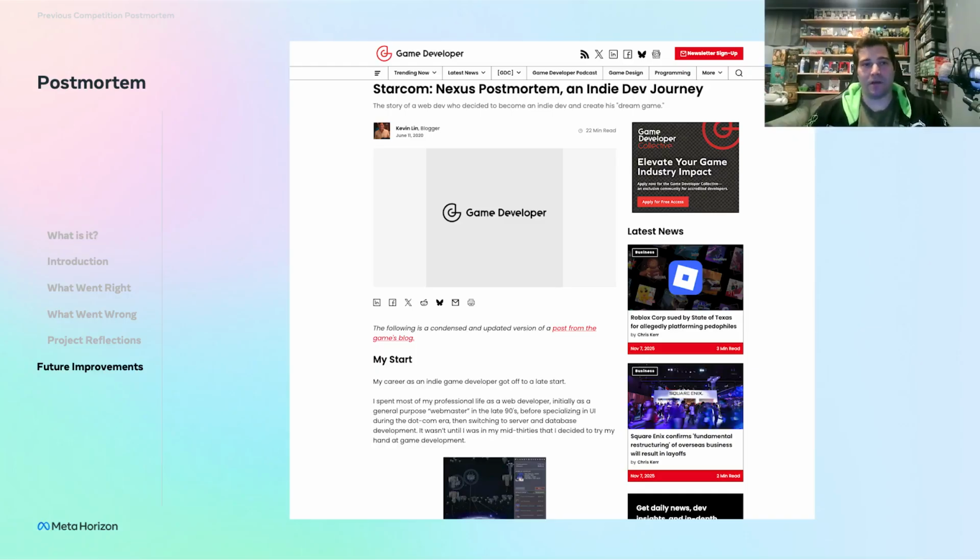And that is pretty much a postmortem. So the most important thing is you want to introduce your project, as much information as you can, like facts, and then you want to look at what went wrong, what went right, key takeaways from that. And you sit down as a team and you go over this and see how you can learn from the mistakes, learn from what went right, your reflections, and put that into another project.